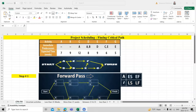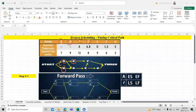In this diagram, certain tasks can be started immediately — like Task A and Task B — because they have no predecessors. For Task C, Task A must be completed first. For Task D, both A and B must be completed. For Task E, Task D must be completed. For Task F, both C and E must be completed. For Task G, only E is required, and then we can finish the project.